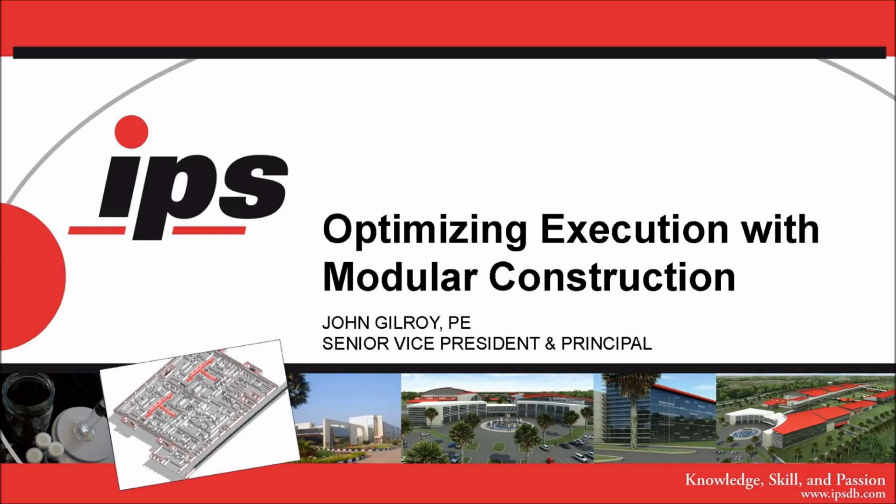Modular skids take up less footprint, so you're saving on overall building size. Workforce and market conditions is also another factor to choose modular construction. You can transfer the labor from the project area to another location, so you're not impeded by just the local labor. Additional advantages is enhanced quality control.